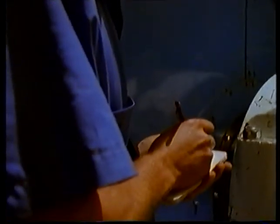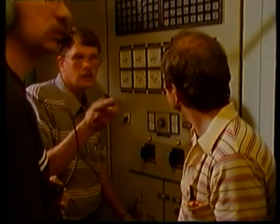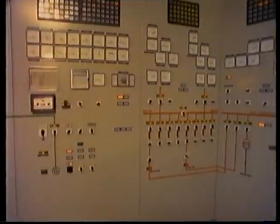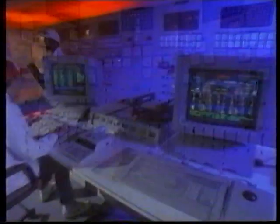Once installation was complete, the remaining pre-commissioning of equipment and systems was carried out prior to rotational tests. The first unit to be commissioned rotated on the 26th of April 1990 and was subjected to a comprehensive commissioning program that included synchronization and overspeed testing. Once the team of Kvana and ABB engineers had verified that the first unit was behaving exactly as predicted, the remaining units followed very rapidly. The average time from first rotation to commercial operation was an astonishing 10 days.